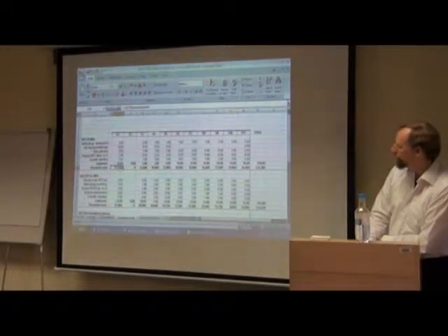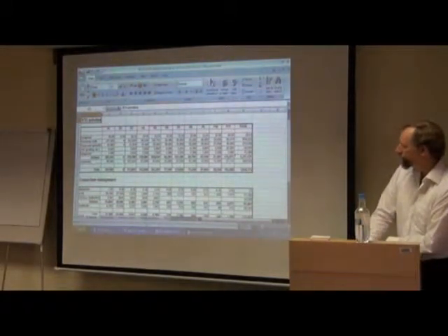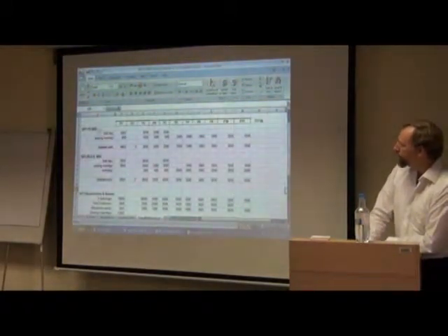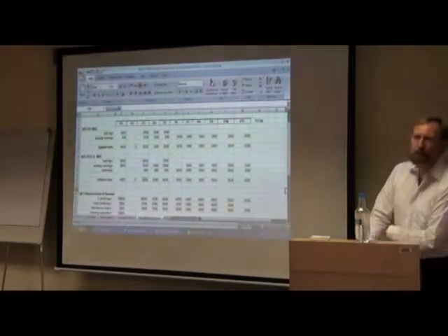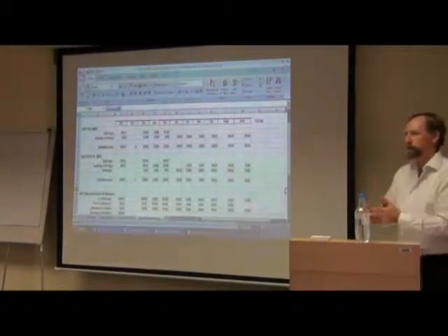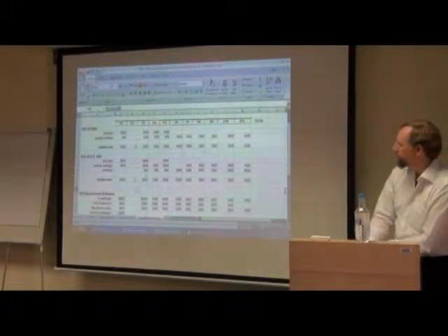And this amount is then copied back into the summary sheet. Okay? Now the same way you do for travel and subsistence and other costs, each partner type of expense per work package, and you can take average sums. For a field trip is so much on the average, and that way you can build up your total budget.